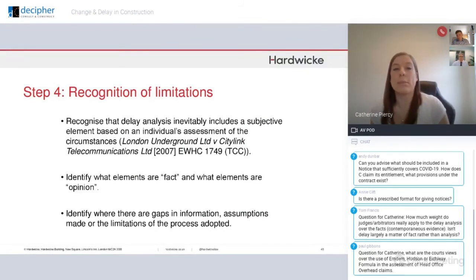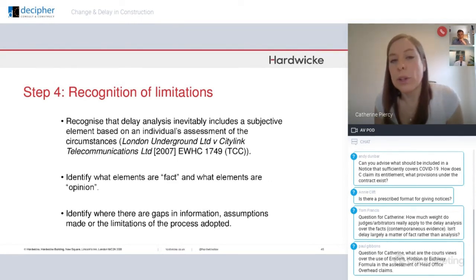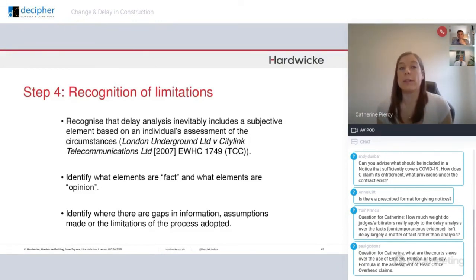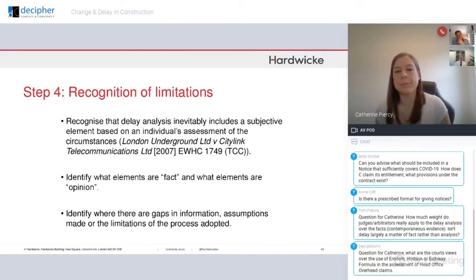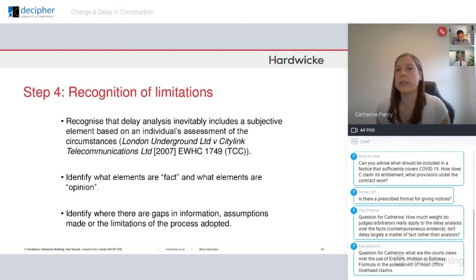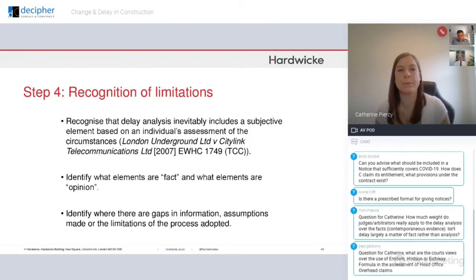Step four: recognise the limitations of the report. There's never going to be a complete world of information available to the expert, so there will always be gaps. The courts also recognise that delay analysis inevitably includes a subjective element. Try and differentiate which parts of the report are fact and which are opinion. Identify the sources of your various information — a photograph is a much better source than a witness account given three years after the event. Identify the gaps, the assumptions, and the limitations on the process you've adopted, because it enables a judge to see you're giving a credible report and doing the best you can with the information available.